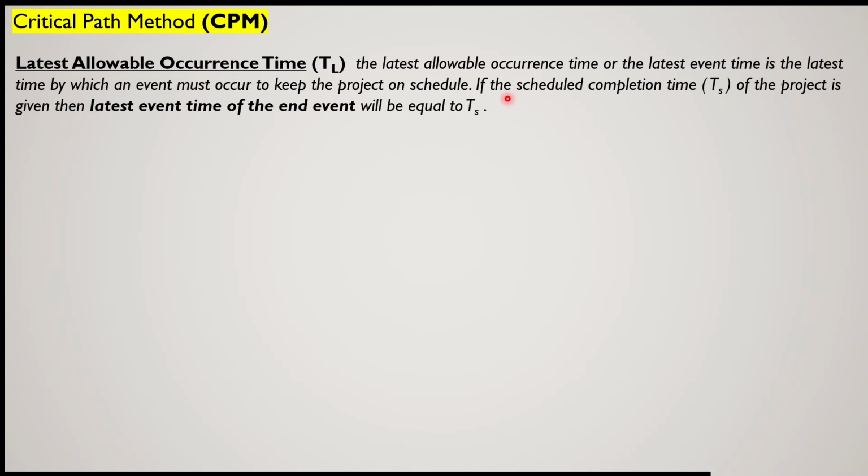If the scheduled completion time is not given, then we can take the scheduled completion time of the project to be the earliest event time of the last event.